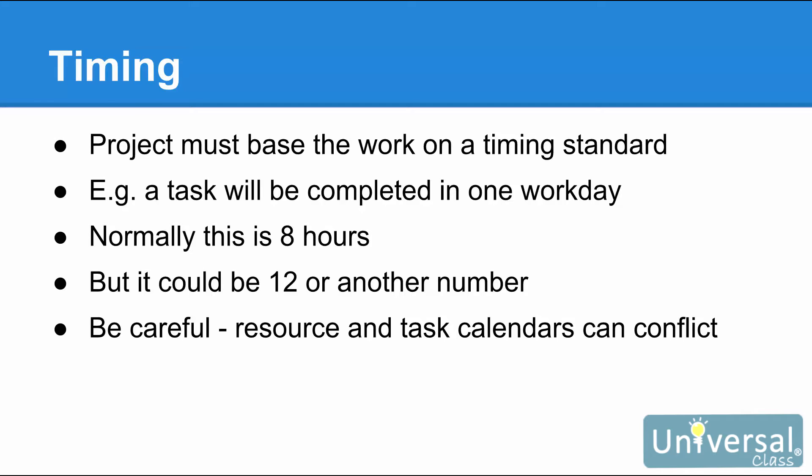Just be careful. If you schedule a 2 week task, but the resource needed to accomplish that task is set for 3 weeks, the task will not show as completed after 2 weeks. It will be 3 weeks instead. This will all make more sense as we move forward and learn more about the program.